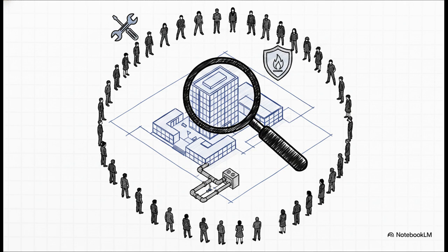We've got to bring in the facility management teams and end users at the 10, 30, 60, and 95% milestones. And why is that? Because life cycle costs will almost always outweigh the initial construction costs. The FM teams are hunting for things the design team might completely overlook.